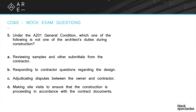The next step up is mediation, where the parties bring in a mutually agreed-upon outside third party who reviews all the information and acts as a reasonable, authoritative sage in the process. They have a fair amount of actual authority, but it's not as much as a lawsuit. It's a big process — you're bringing in outside people, so it costs money, and people can spend a lot going through mediation.